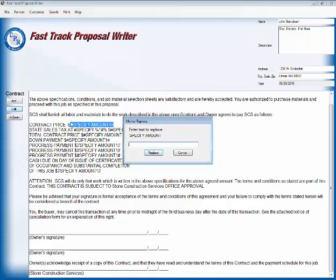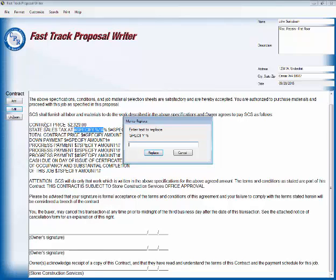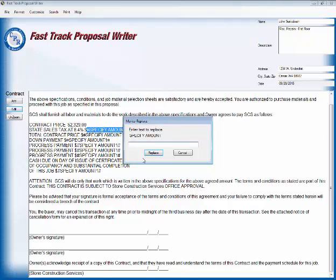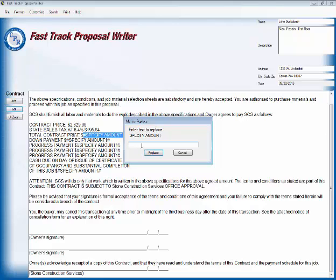Now notice here also right there, you'll notice that there's a dollar sign there. So all we're going to do is put in the contract amount. So two comma three 29. This is the number that came off of the estimate that we did over in the fast track estimating program. I just copied the numbers down and I'm going to use them. So we're going to replace that number. See how it puts it in there. State sales tax at eight point four percent. And those percents already in there. So replace. And we're going to specify the amount. It would be 195.64 cents. And we're going to replace.